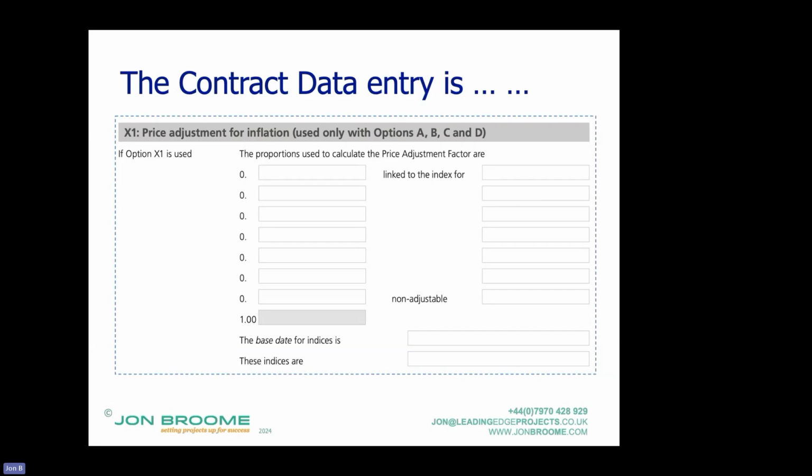But I would recommend you keep it simple, having looked at this. Often contractors, rather than going steel work and concrete and road costs and so on, on a new road, we just did new build road costs, because essentially the proportions are a bit of a guess. The indices don't exactly correspond with how they're incurring costs. So overcomplicating it just means it's a bit of a guess.